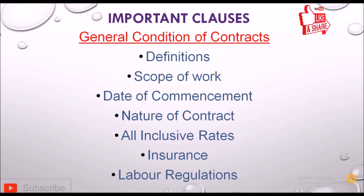Labor regulations is a very important clause. The contractor will be responsible for all labor laws such as payment of wages and related matters. So to summarize, the clauses covered so far are: definition, scope of work, date of commencement, nature of contract, all-inclusive rates, insurance, and labor regulations. A few more clauses are still remaining.